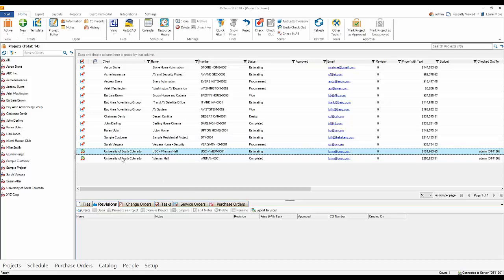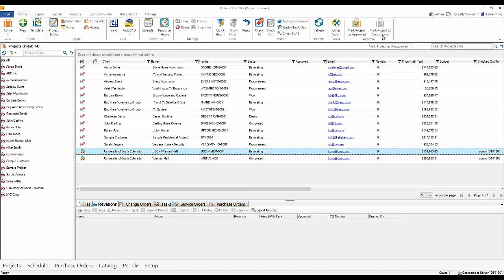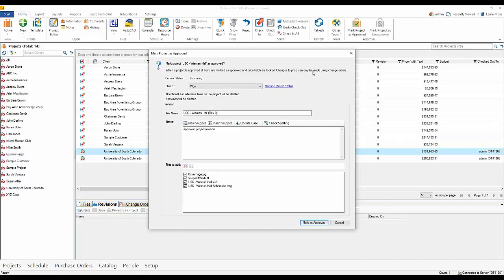Let's start here. Mark as Approved is a big new feature tied directly to change orders. I have a project checked out — it's in the Estimating status. We changed what used to be called 'progress' to 'status.' We're going to go through a scenario where this job was accepted, the client reviewed the documentation and wants to buy. When that happens, you can approve a project. The ability to approve — and even unapprove — a project is permission-based, so you don't have to allow all users this ability. Maybe only a PM should be able to do this.